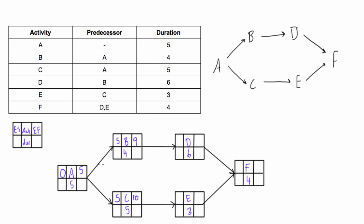Same thing here: activity A is five days long and activity C is five days long, and it can't start until these five days have already been done. So the earliest that activity C can finish is day 10, the end of day 10.